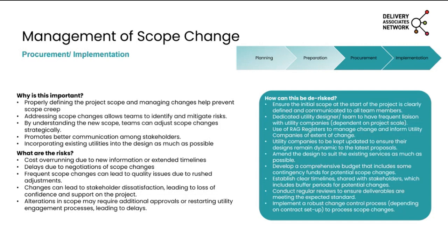There is a risk as well if you go to a utility company, we found this on other projects, and say, oh, there've been some changes to the project. They panic and think that everything that they've done to date is now completely out of date. They throw in an early warning notice and a huge bill, and it sets the hares running a little bit. So how you manage the communication of any change is also critical.